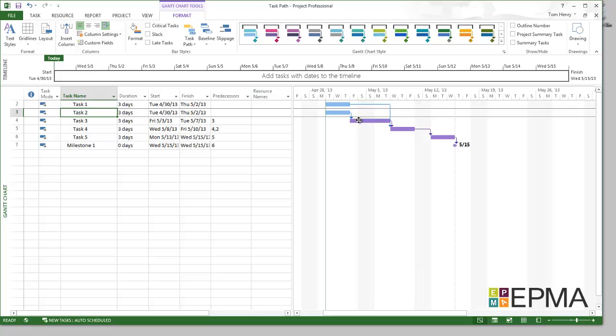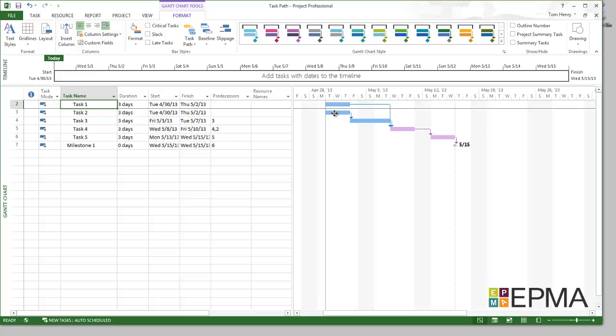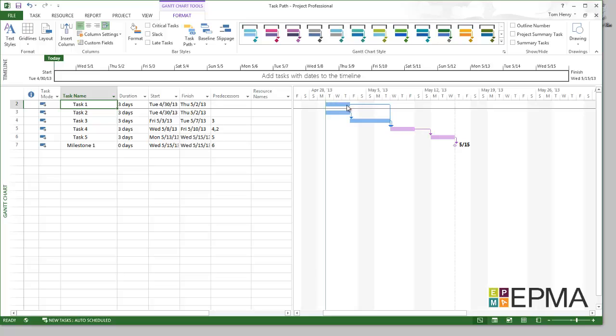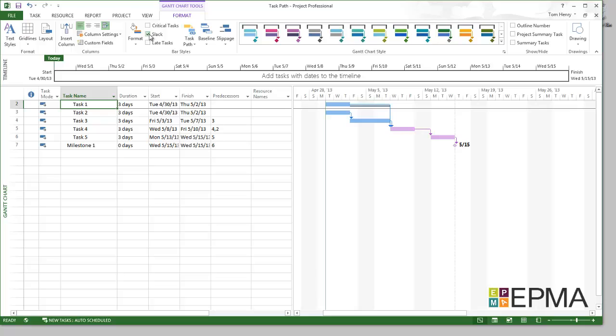I can see the Gantt chart is updated. Now I've got the purple ones which means driven successors. So for task 2, should that duration be increased, it will push out these 3 tasks start date. And task 1, it wouldn't actually push out these 3 because they're driven by task 2. And there's actually some slack in task 1. I can see the slack by using the slack checkbox in the bar style section format ribbon as well. So I can see that slack, therefore they are not driven successors.